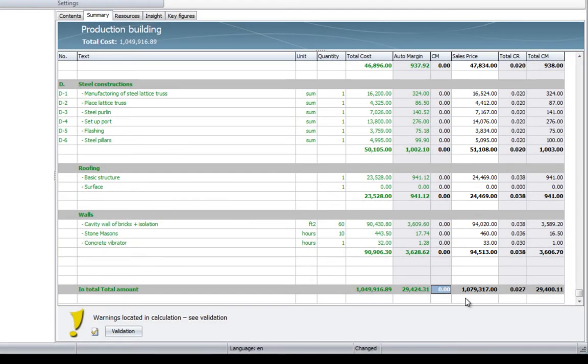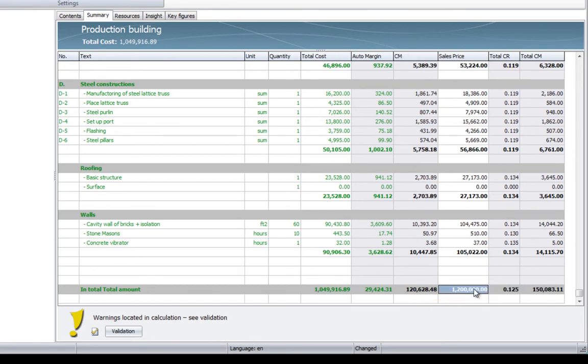Now, if you want to change this, let's say to 1.2 million, we just type it in, and Sigma will automatically figure out where to put the additional profits based on a linear analysis of the entire cost estimate.